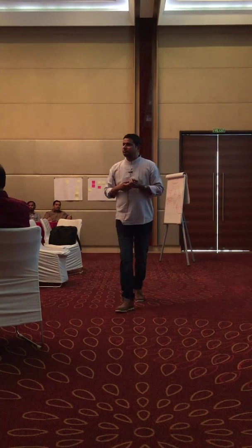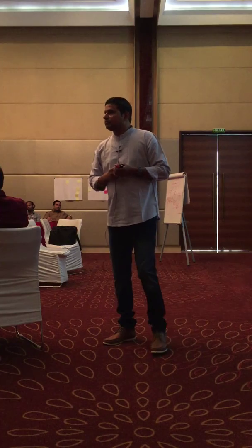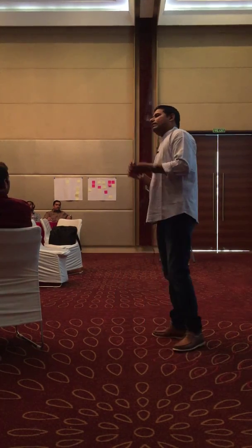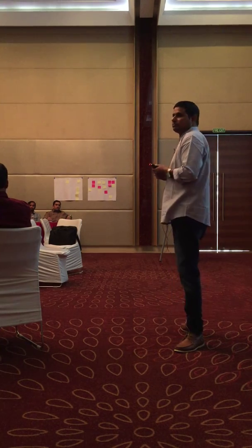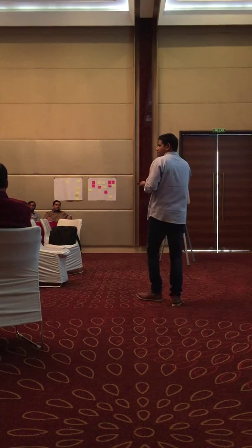Sprint backlog means it should correspond to the current sprint, or can it be future? Every sprint has its own sprint backlog. But we don't decide for the future. We decide on sprint planning day what we'll take up in the sprint. Yes.